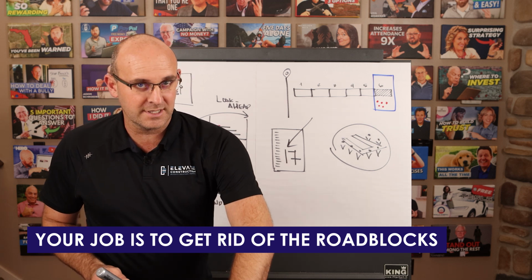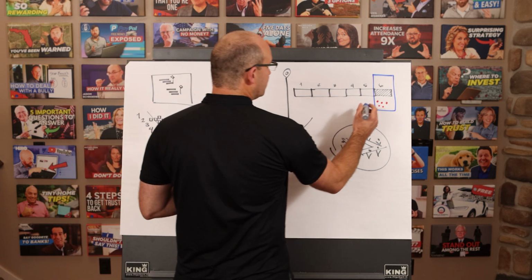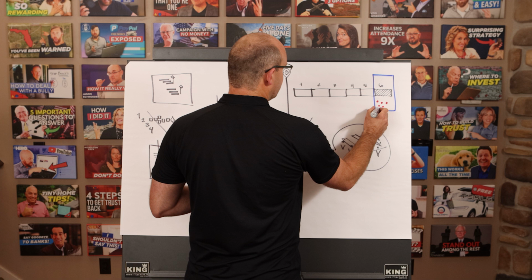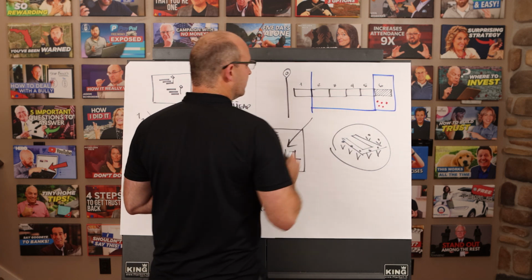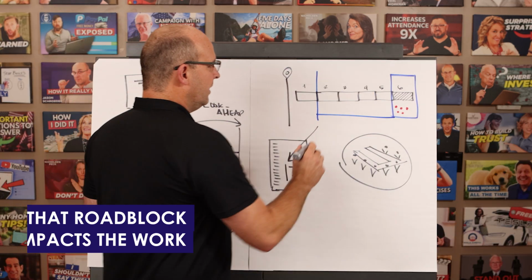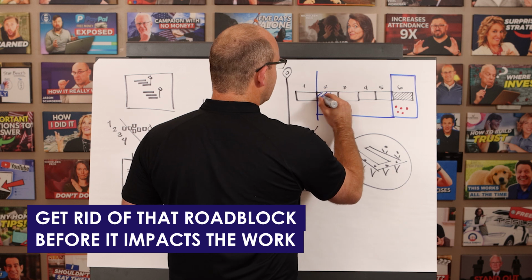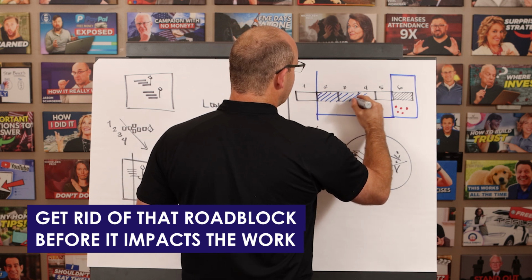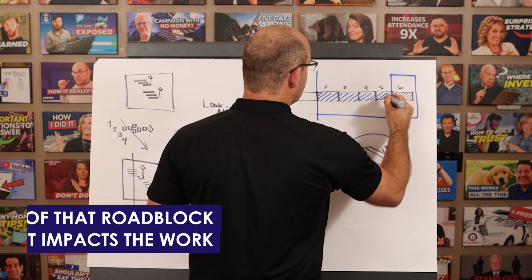I hope you're sitting down. Your job is to get rid of these roadblocks between week 5 and week 2. You have 4 weeks in here to get rid of that roadblock before it impacts the work, before it hits the weekly work plan.